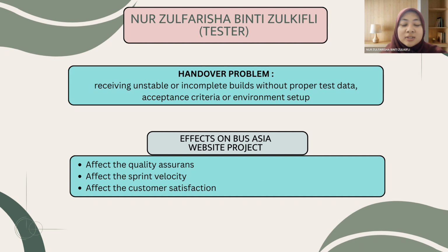As a tester, one possible handover problem that I faced in the Bus Asia website project is receiving an unstable or incomplete build without proper test data, acceptance criteria, or environment setup. For example, in the Bus Asia website project, the seat booking module was handed over without back-end integration or clearly defined user stories. As a result, I couldn't validate its functionality effectively.